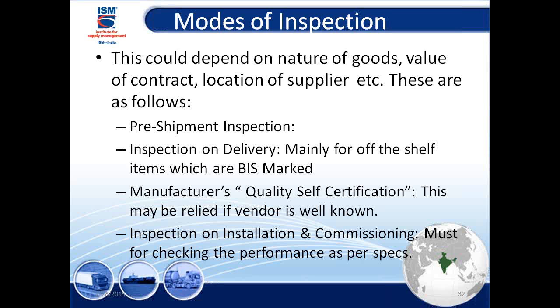Then the modes of inspections. Certainly you could have pre-shipment inspections. You're buying some medical items, some pharmaceutical items, some complex material. You want to see the composition. You want to see how the process is going on. So at the manufacturing stage, from the raw material till the end of it, you want to check the inspections around. That's what we call pre-shipment inspection.